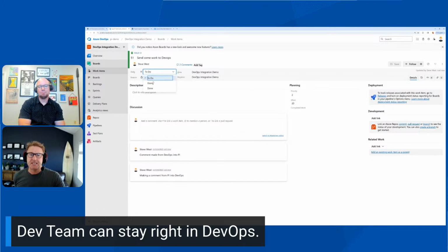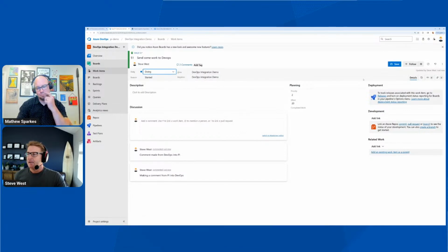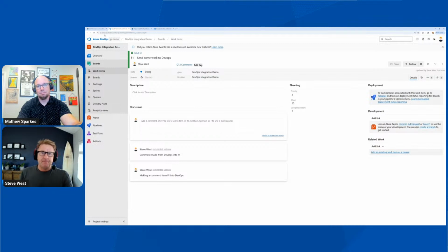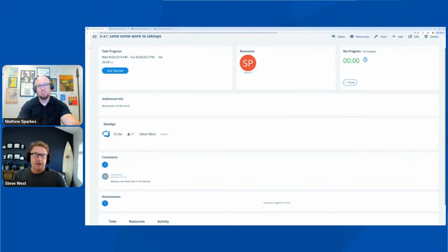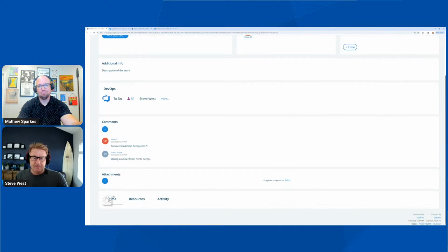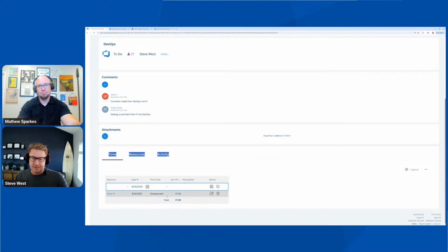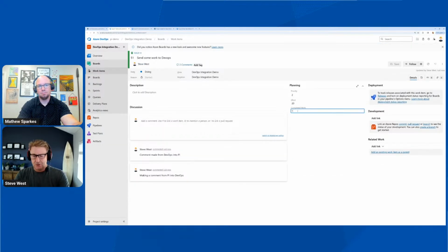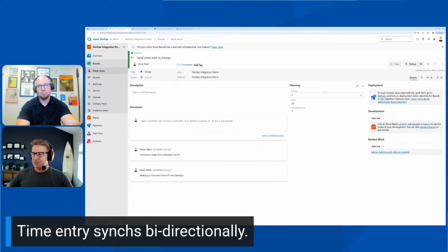So if I go in here and say, you know what, I'm doing this now, and I'm actually going to add an hour of completed work. Once I save that, if I navigate back to that task, you'll see that comment is made there, and there should be an hour of time. There's that time that got added. So as the resource in DevOps continues to work this task, you can optionally have this information go right into the time tracking of Project Insight, the time entries.